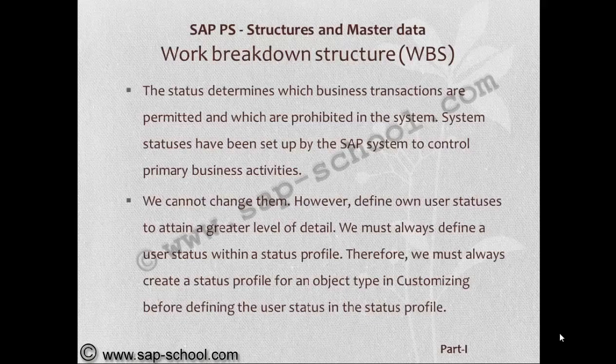System statuses have been set up by the SAP system to control primary business activities. We cannot change them, however, we can define our own user statuses to attain a greater level of detail. We must always define a user status within a status profile. Therefore, we must always create a status profile for an object type in customizing before defining the user status in the status profile. So the status profile for the user statuses plays a very great role in the business process of project system.